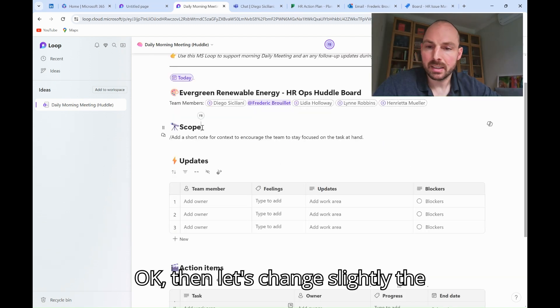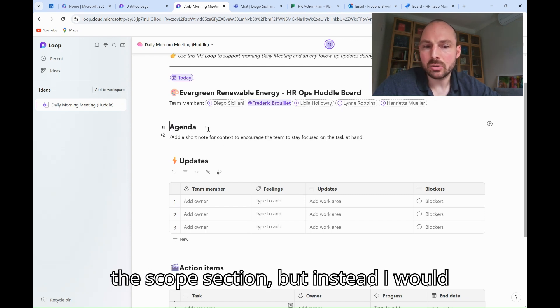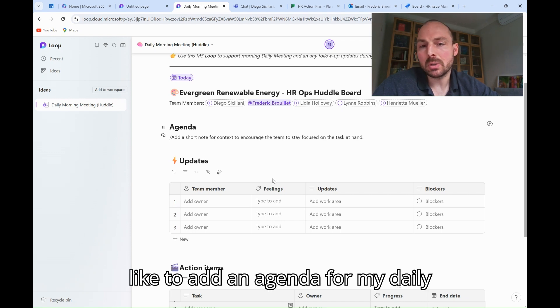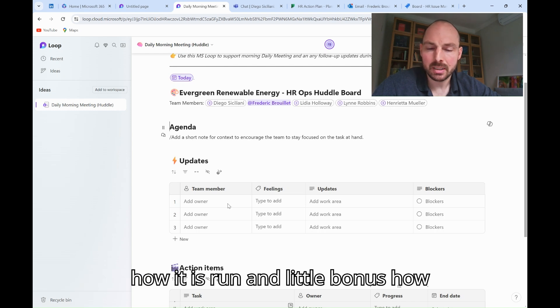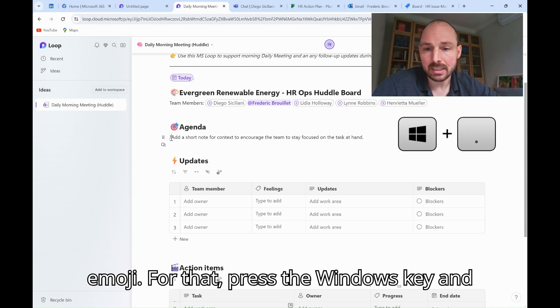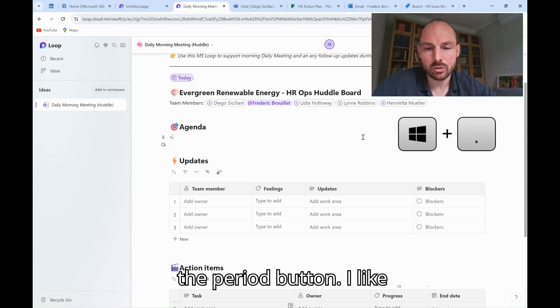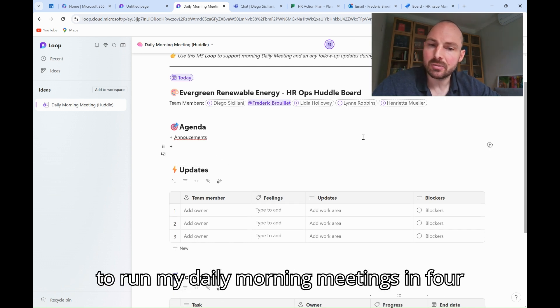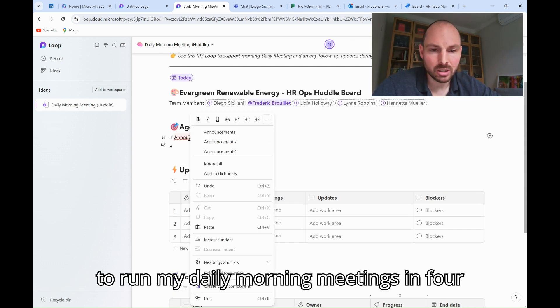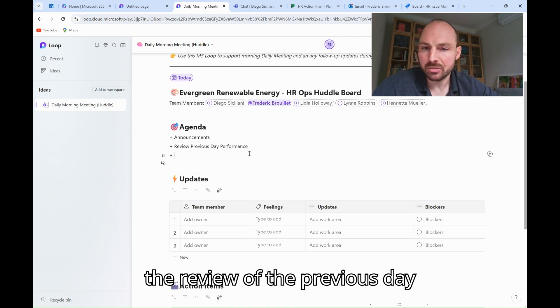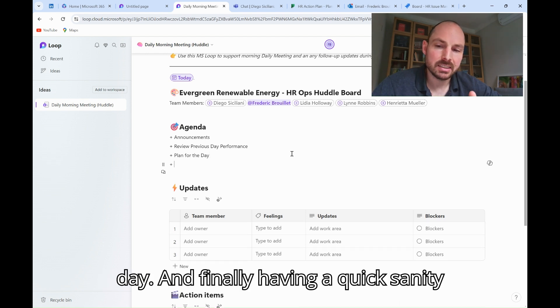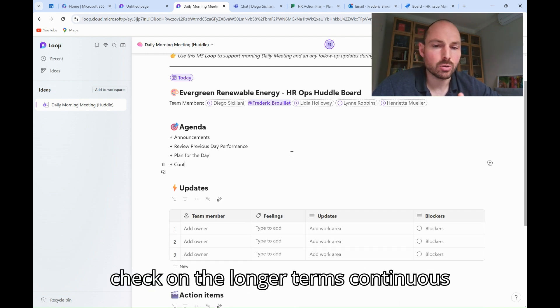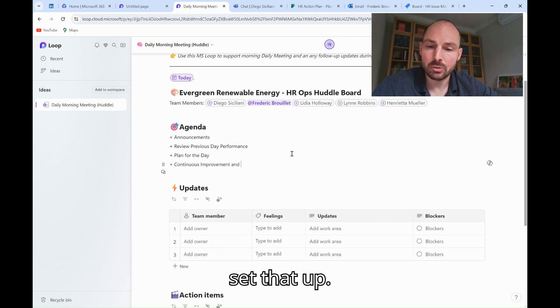Then let's change slightly the sections of this template. I don't need the scope section, but instead, I would like to add an agenda for my daily huddle, so we get some consistencies on how it is run. And little bonus, I will update the emoji into a target emoji. For that, press the Windows key and the period button. I like to run my daily morning meetings in four sections. One for announcements, one for the review of the previous day performance, one for the plan of the day, and finally, having a quick sanity check on the longer-term continuous improvement initiatives. So I'm going to set that up.